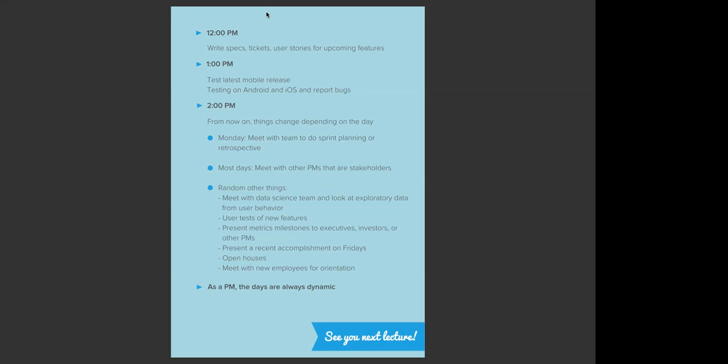Once you have the stories groomed and prioritized, your team rallies around and does sprint planning. Which ones are we taking in? This ticket is ready to be taken in. Let's look: everything's ready, designs are attached, all the edge cases have been explained, everything that needs to go into that story is there. We look through all that, and then we say how long we think it'll take. So we have what we call t-shirt sizing. Is this a small, medium, large, or extra large? Some people use a 1, 3, 5, or 8.